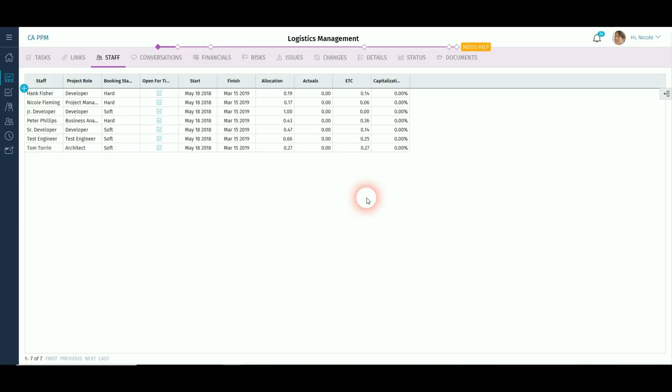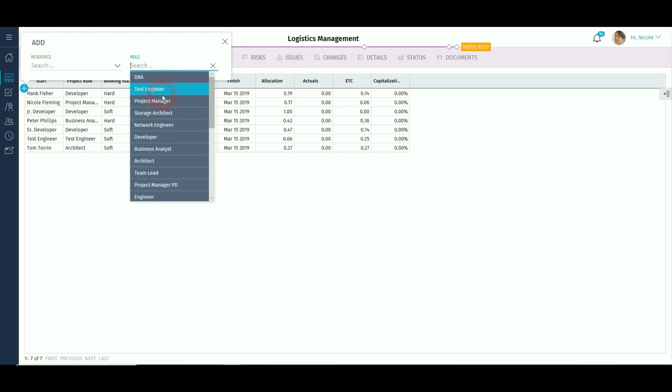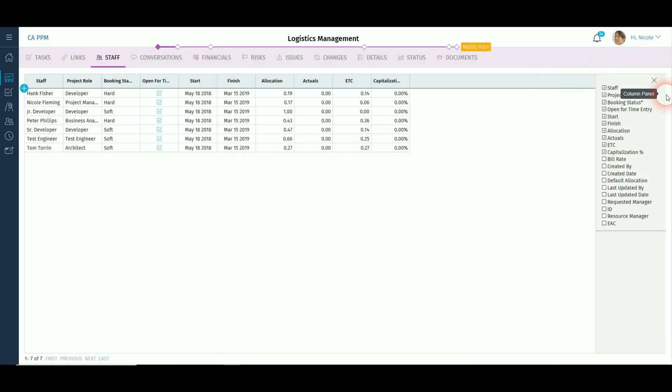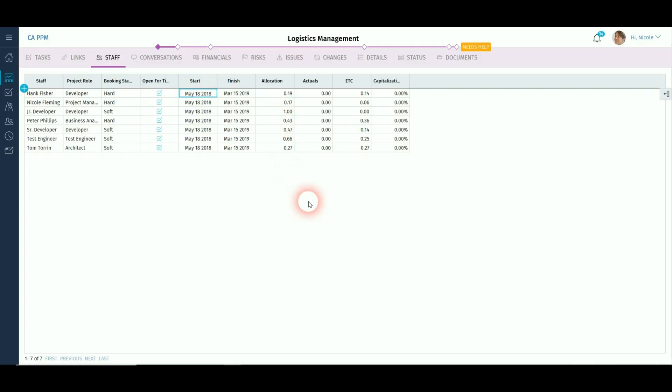The roles and resources can be booked to the project through the staff link. The resources and roles are presented in a grid format and similar to other parts of the system, attributes can be added and removed using the link on the right-hand side. Allocation details, booking status, open for time requested manager and user defined fields, amongst others, can be amended on this list screen. If you have financial rights, the capitalization percentage can also be amended.